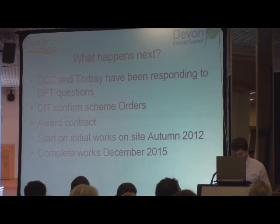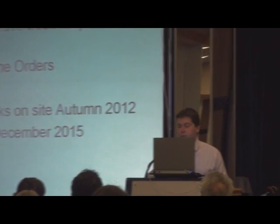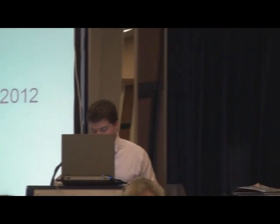What happens next? This is probably the most important thing. And we do have to say that there are still a final couple of hurdles that have to be overcome. Firstly, the public inquiry was held, and the Secretary of State has published their decision and has confirmed all the orders. Technically, somebody could still take that to the High Court and challenge it, and there is a standstill period at this moment in time where that can happen, but we hope that won't.